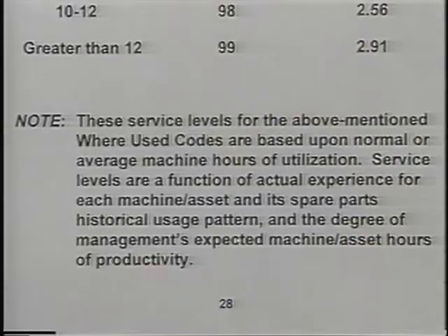One of the applications that sometimes we have a problem with, in planning PM work orders where we have a shop calendar, is noted on the bottom of page 28 as a note. And this is tied in with the shop calendar. Let's assume that we have a PM work order and the frequency code is every 90 days. I'm supposed to have a particular PM activity applied to that particular machine. But you notice in the note, it indicates that that time element is predicated on operation of a one shift, 40-hour week. So that means over a 90-day period, I'm operating one shift 40 hours a week.